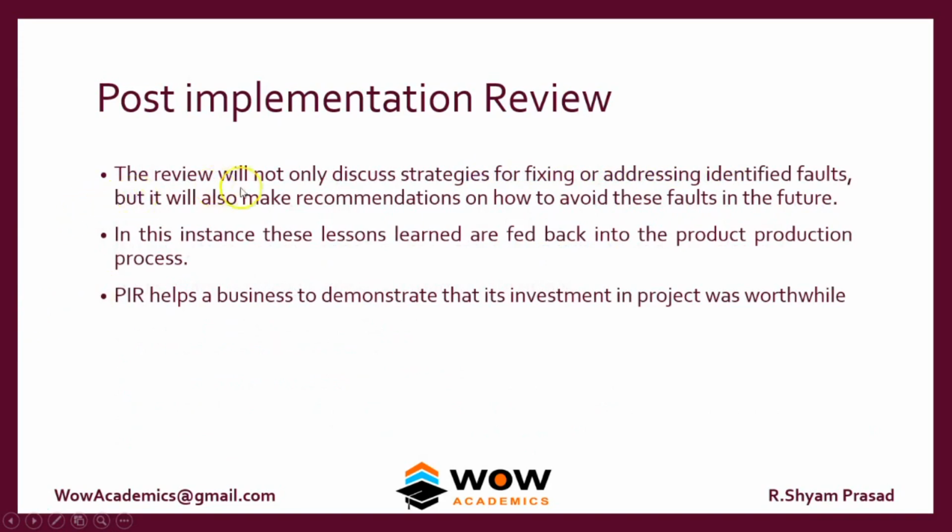So the review will not only discuss strategies for fixing and addressing identified faults, but it will also make recommendations on how to avoid these faults in future. For example, if there's a metro train in Chennai, the same train might be constructed somewhere in Delhi. So the mistakes which they learned in creating a metro train network in Chennai, they can avoid while constructing in Delhi.